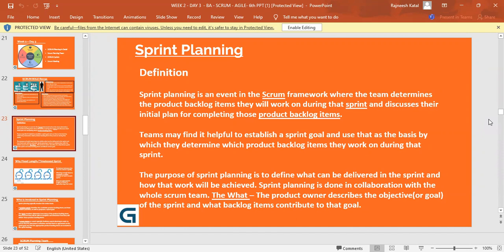So in this scenario, as a Scrum Master and as a product owner, we have to take a call with the customer that, okay, not 4 weeks, but we might require 2 sprints. We'll have it delivered, but we'll take more time. And this is of highest priority. Any other smaller task, like changing color, changing pictures, or maybe changing some layout and design, will have less priority.